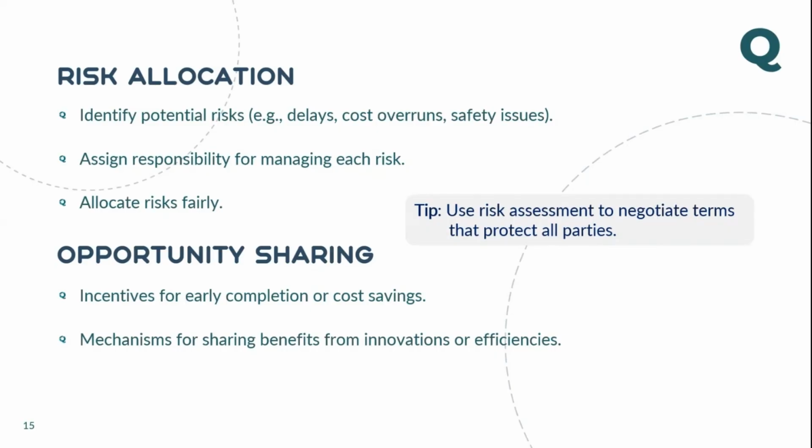So you have to make a remedy for how you are going to manage this risk. I cannot avoid this risk because the payment terms say so. So can I negotiate for this? Can I ask for advance payment, or can I arrange a bank loan? This is the perspective you have to look into, how I'm going to mitigate this risk.